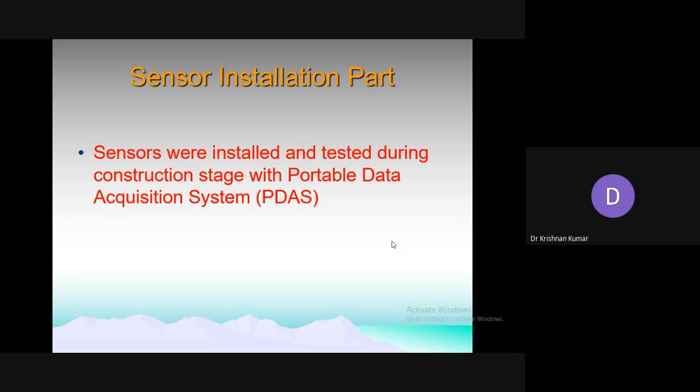When all these things are over, first we have to make a design of sensor placement, number one. Next we have to do the design of the hardware. What kind of hardware we have to use, what is not available, what additions to the hardware are needed, and how we are going to operate it, that also we have to design. When that is over, we have to go for the power design.